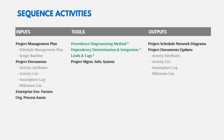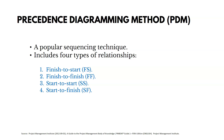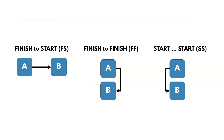The tools include the Precedence Diagramming Method (PDM), dependency determination, and leads and lags. PDM documents four types of relationships: finish-to-start, finish-to-finish, start-to-start, and start-to-finish. Here's what those might look like on a network diagram.